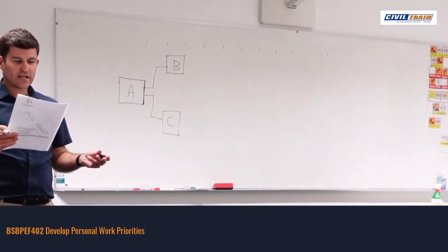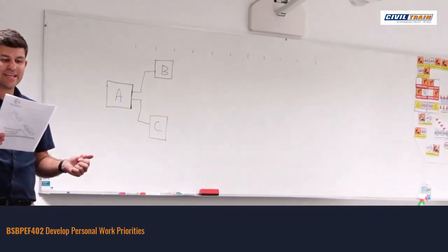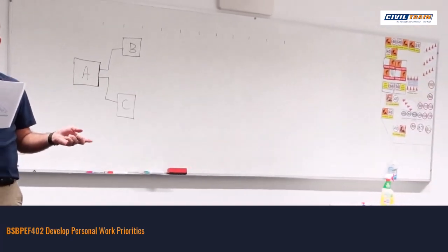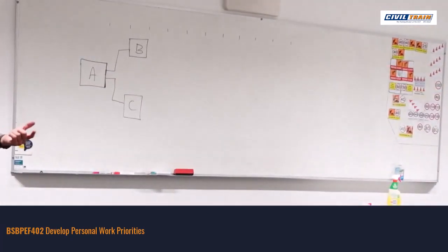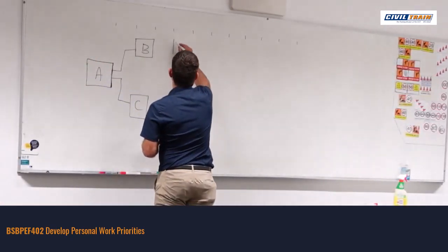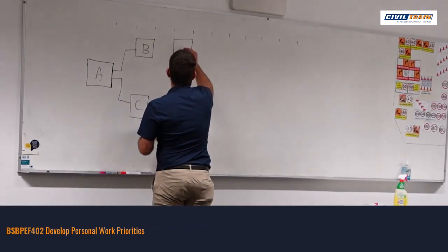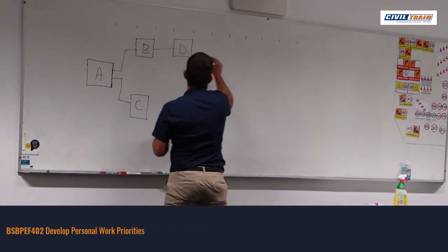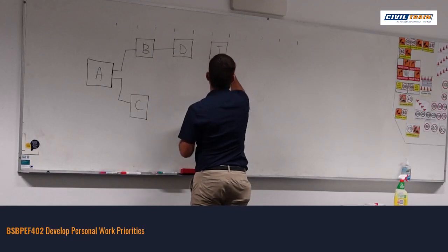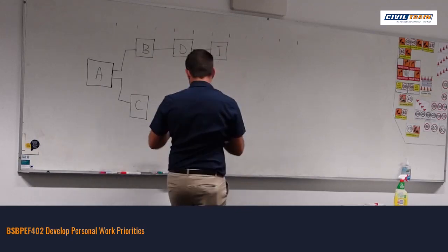Then I've looked at the information, and I've got D precedes I but follows B. So D's before I, but then follows B. So I'll put in that D follows B, but precedes I. So it's before I, so I comes in there. Just using that information.